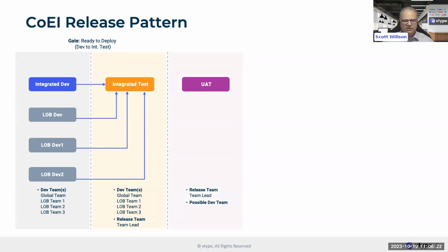Yep. And so then as we move on, there's that next level. I've got some Excel spreadsheet icons here. If you want to explain what those might be and what happens when we move from an integrated environment to a UAT environment. Yeah, so this is where you start building out those run books, right? How am I going to deploy this? How do we handle a big release that spans multiple dev teams? We need to track what update sets need to go, what order they need to go in, or do we have any fix scripts that need to be run at a certain time, XML data that needs to move, right? And you've got to start building out those run books and basically practicing with those run books.